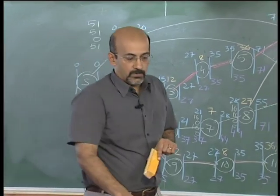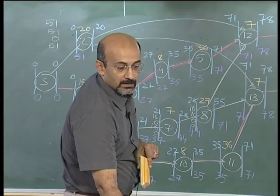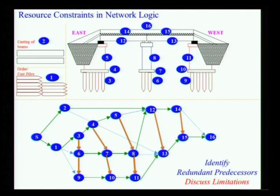Now we will move on to looking at resource constraints in the network logic. I have actually shown a bit of the constraints which I want to use and I want to discuss this a little bit before I actually start. We are the same network. Now, all I have done in this is to say that activity 6 can start only after the resources from 3 have been released, because 3, 6 and 9 are piling. I am saying I need a piling rig, I can only start 6 after 3 is complete, I can start 9 after 6 is complete.